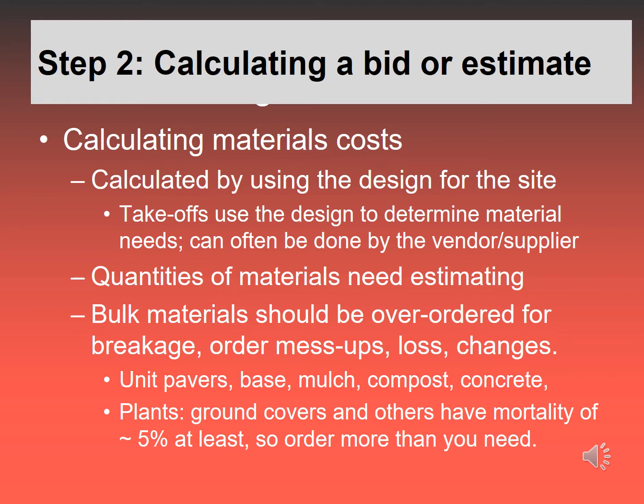You're taking off each line item of the project and looking at the cost of it, like all the sandstone pavers, all the base material that goes under the pavers. What's that going to cost? You need to know how to figure out volumes, lineal footage and square footage, and convert that to how much the costs are going to be.